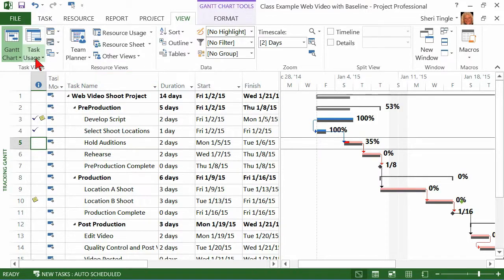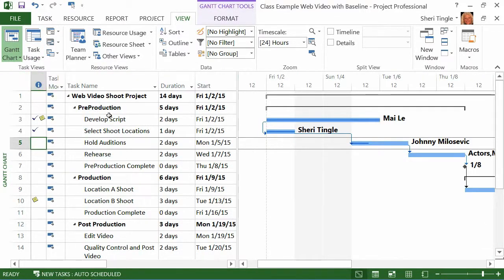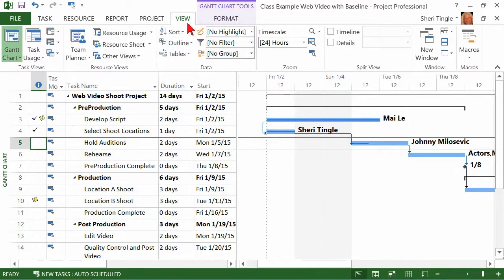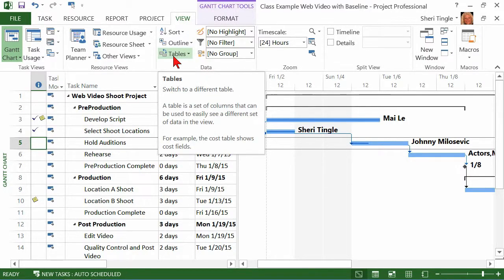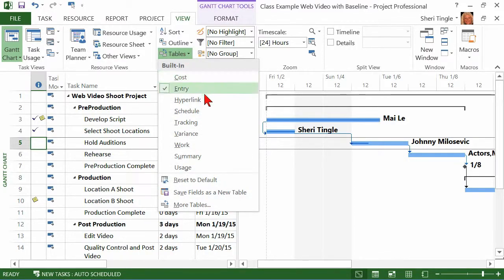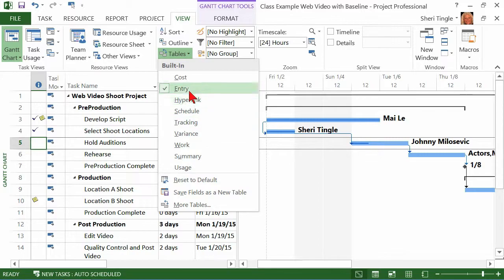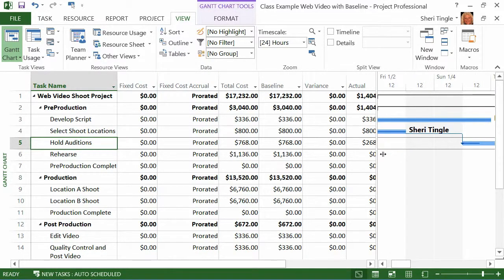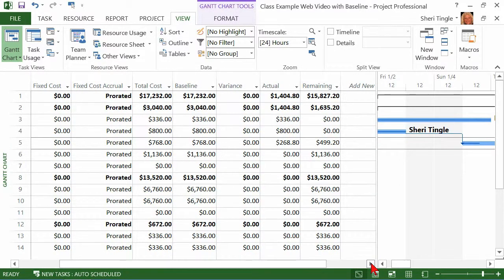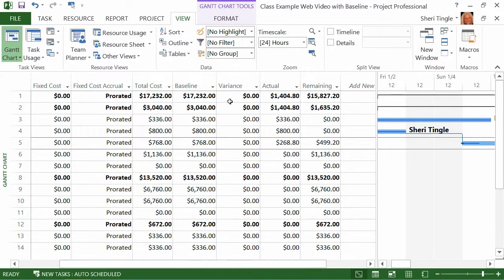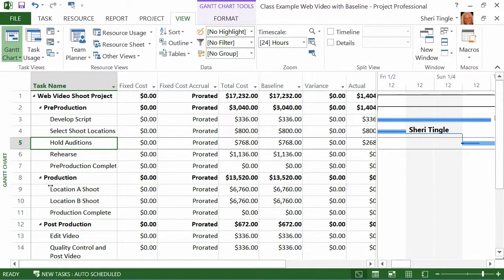Now this view or if I go back to Gantt chart view, it doesn't matter. They both have tables and many other views do as well. So where you're going to go is just move your way down the ribbon on the view ribbon to the data group. And here's a group for tables. And so what you do is you just drop this down and there are multiple tables that are available for you. And one of the tables is cost. So let's drag this out. And now you can see per line, you can see all the costs. You can see the fixed, total, the baseline, the variance is off of the baseline, the actual, and the remaining.